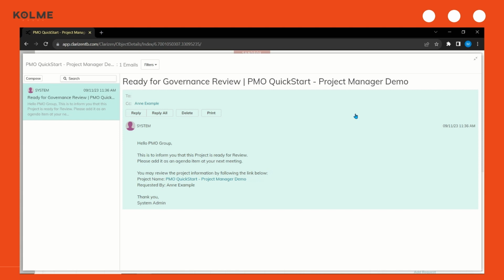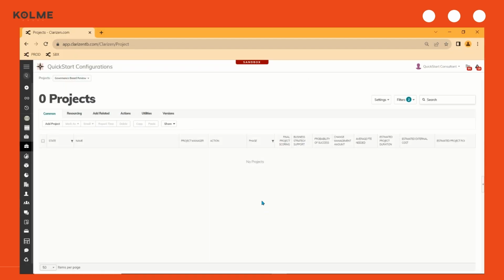I'm now going to pull over another browser to show you what the PMO manager approval process looks like. I have a list here of project requests awaiting decision. The PMO members or project approvers can view the individual responses made on the scoring form as well as the final project score. This field's calculations can be updated to match your company's scoring values and weighted criteria for project prioritization. Once I've reviewed this project request, I can move forward with my decision.